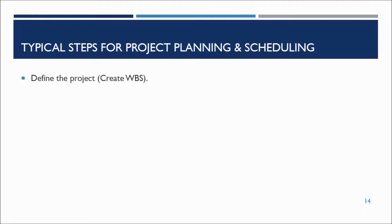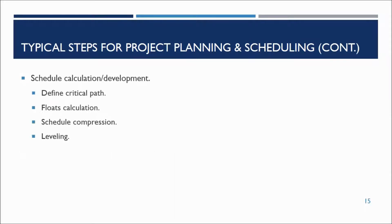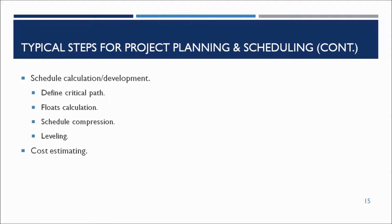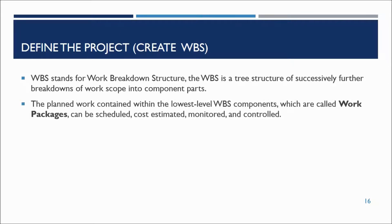Typical steps for scheduling might include creating a WBS to define the project, listing project activities, sequencing the activities, estimating resources and duration of activities, schedule calculation to define the critical path and perform the required leveling, cost estimating, and budget developing. Creating a work breakdown structure is the process of subdividing project deliverables and project work into smaller, more manageable components. The lowest level WBS components are called work packages.